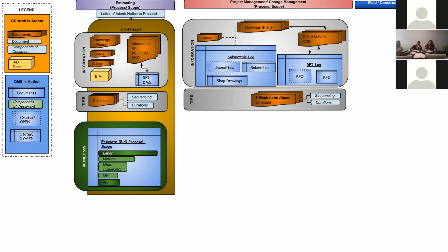They will give us 5 days for installing drywall, and they will give us 10 days for taping or finishing the drywall. Those are general blocked out rules of thumb for our scope of work.